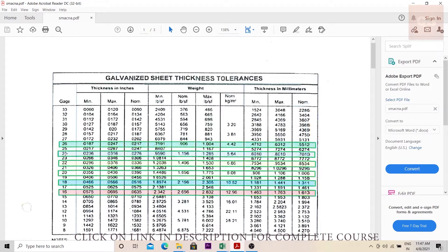Gauges 26, 24, 22, 20, 18, and 16 are the normal gauges used in a construction project. The corresponding multiplication factors to find out the weight are: gauge 26 = 4.42, gauge 24 = 5.64, gauge 22 = 6.86, gauge 20 = 8.08, gauge 18 = 10.52, and gauge 16 = 12.96.